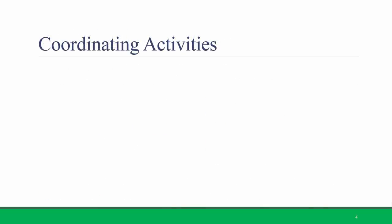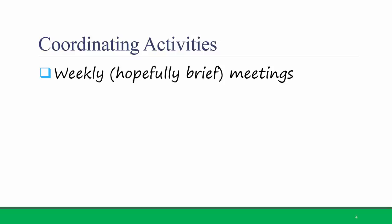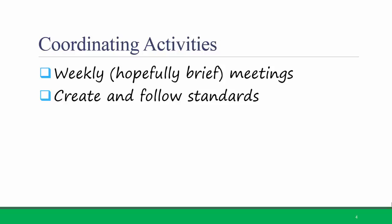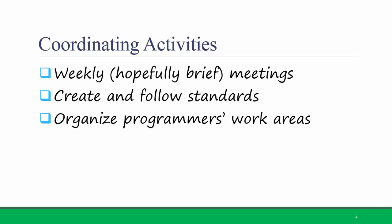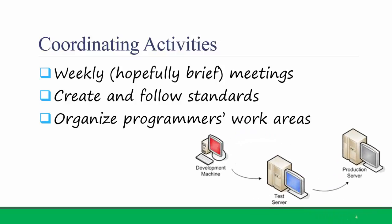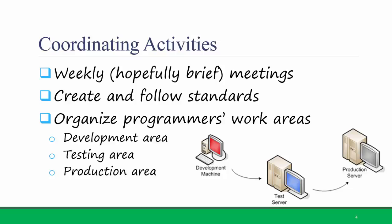Here are some best practices for coordinating activities during the programming process. First, hold weekly, hopefully brief meetings and create and follow standards. These two tips will help keep everyone on the same page and make coordination easier. Another best practice is to organize programmers' work areas. Usually programmers shouldn't code the software on the production server or the area where the system will actually be implemented. A development area is where the actual coding happens. Testing is a separate place where active testing occurs, but not with true organizational valid data. Only after the software has been thoroughly tested should it be installed in the production area.